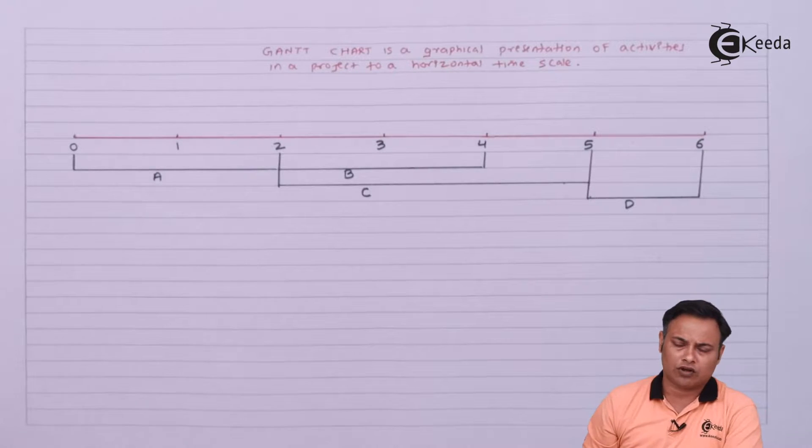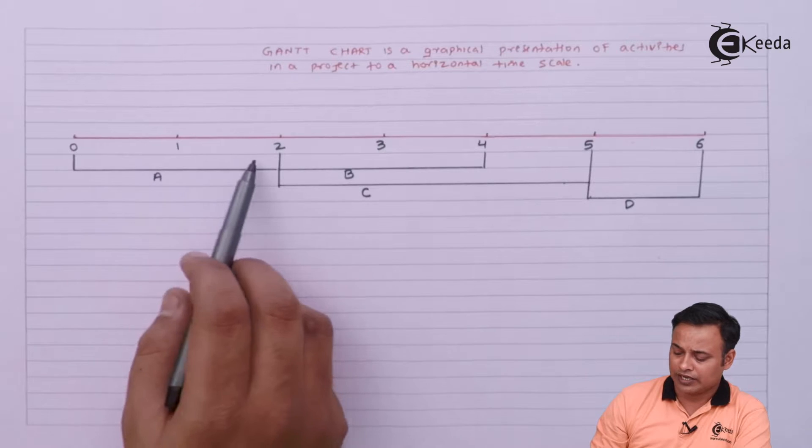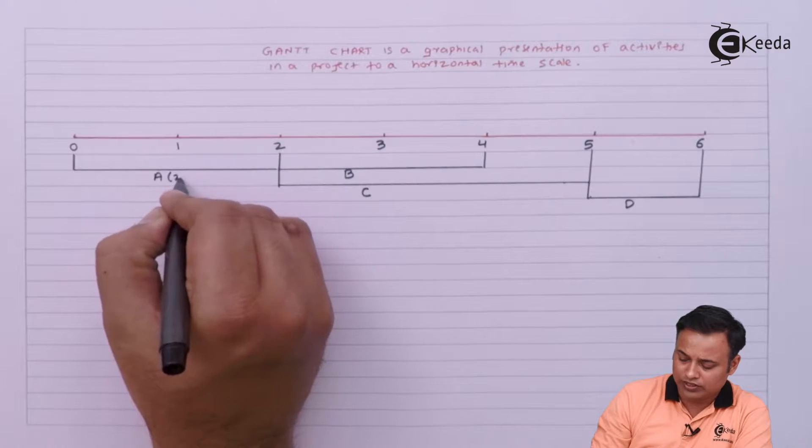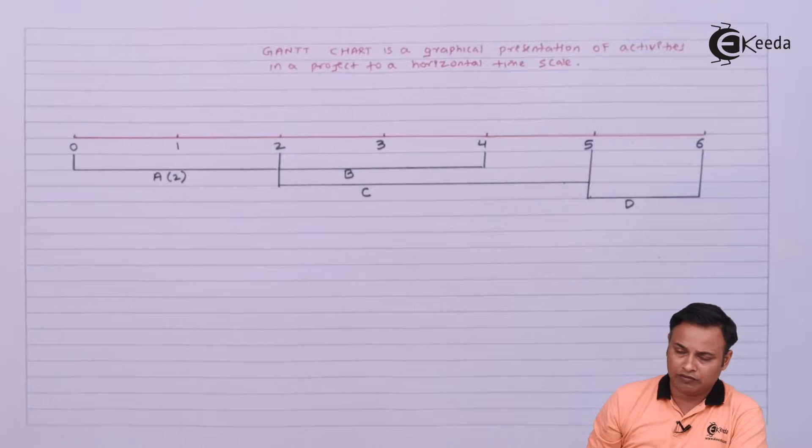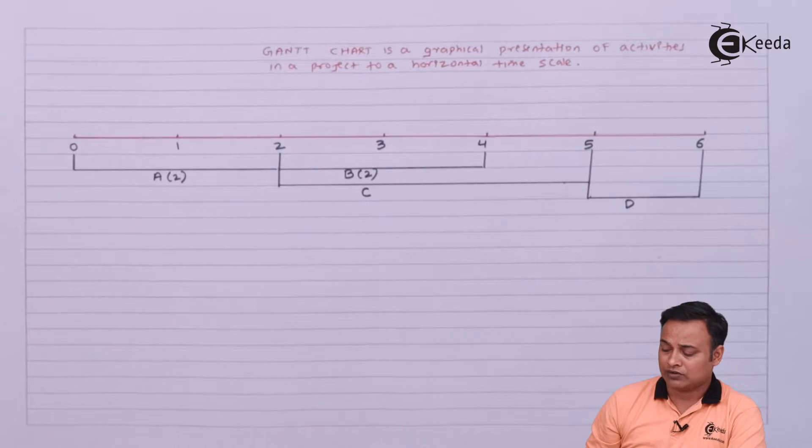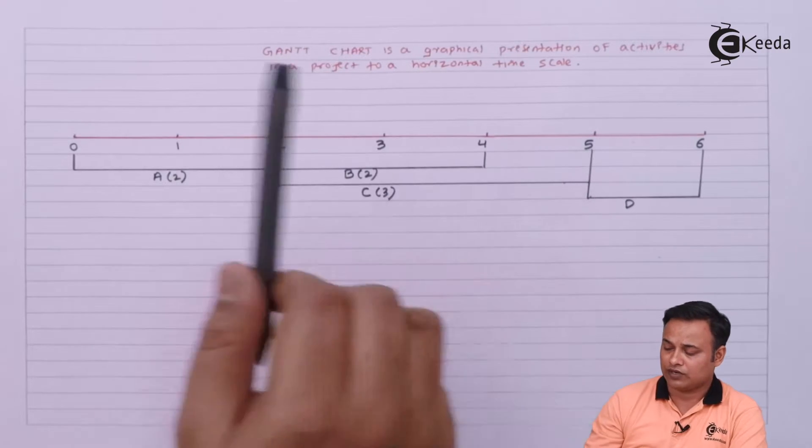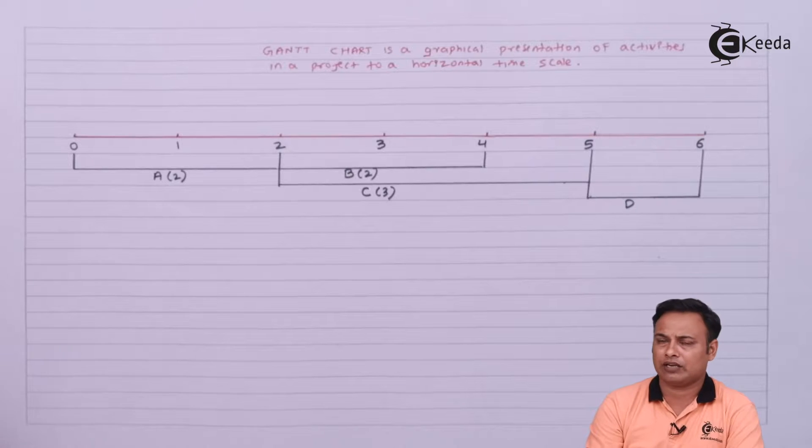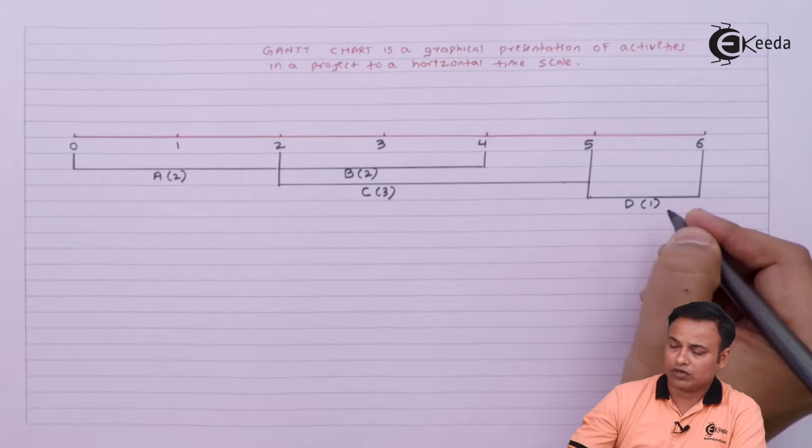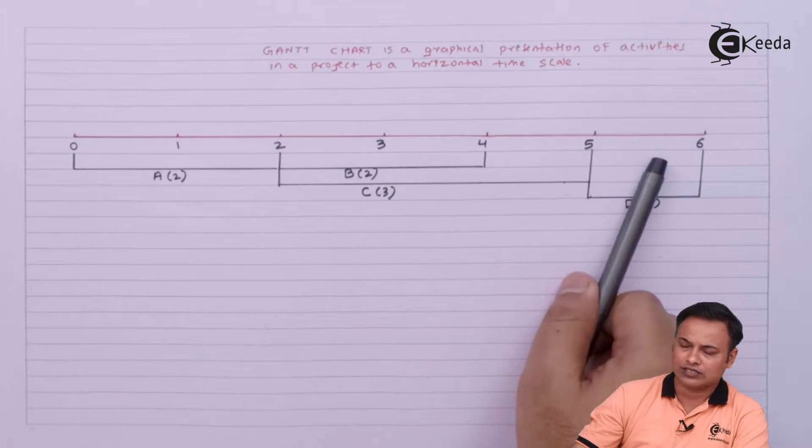My project is for six days. First two days A will take, then after that B will continue for another two days, third and fourth day. At the same time I will have C which will continue for three days - third, fourth, and fifth day. Then we have activity D which will continue for another one day, the last day of the project.